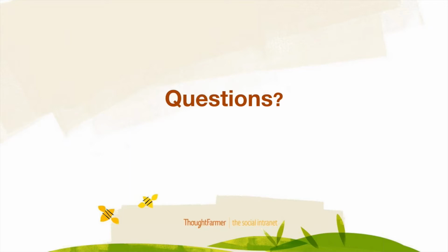That is a good question, and I would say that yes, they are. What I've highlighted here in the presentation would definitely assume that you have somebody or some buddies who are working with you and who have really dedicated some of their time to work on this project. Like I said there, if it's just you, and this sometimes happens, especially with smaller companies, we do see clients where there's one person really tasked with the entire implementation. You're definitely going to see those tasks usually become a little bit longer in time estimate.